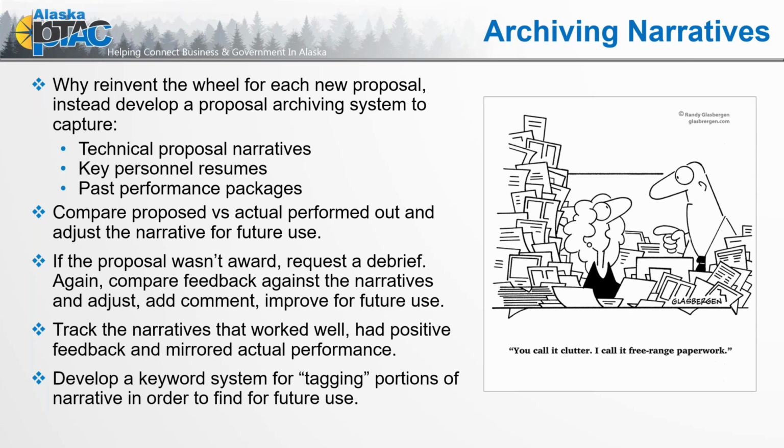And then I started tracking their hours and their costs and comparing it against his proposal. And I found out that he was losing money, sometimes small amounts, sometimes large amounts, because he was maintaining his proposal process exactly the same from customer to customer without going back and looking at performance versus what was proposed. And once we started reviewing that after the completion, or even at stages in the completion, we could see where the costs were different than what we had proposed, so that we are maintaining profitable performance.